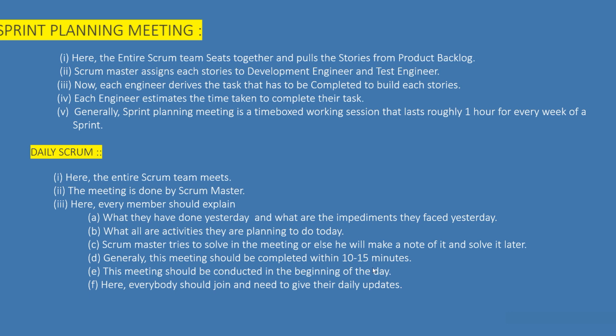Generally this meeting should be completed within 10 to 15 minutes, and should be conducted at the beginning of the day. Everybody should join and give their daily updates. So it is called daily Scrum.